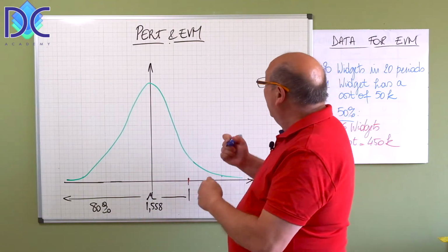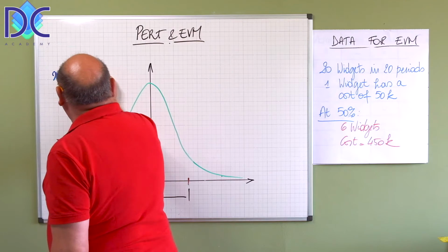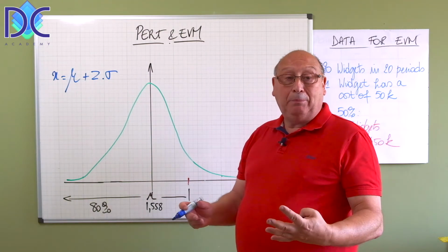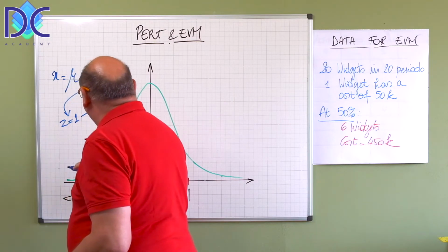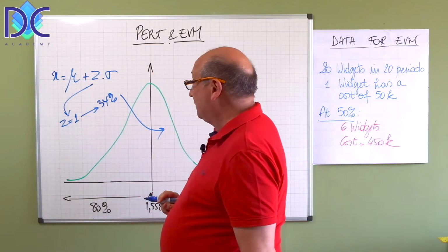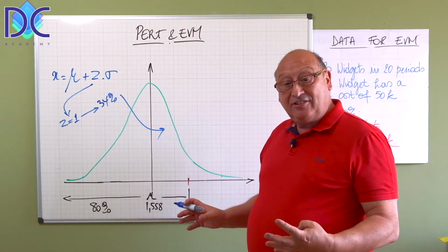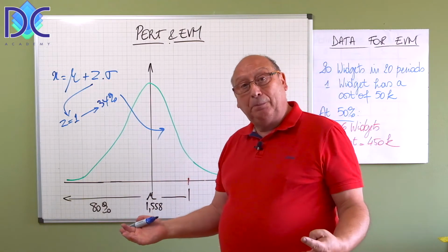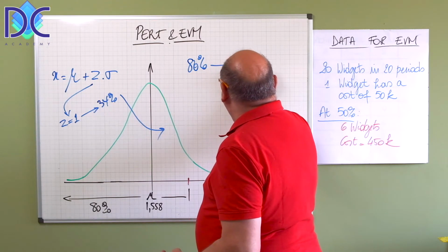Now, there are things about the formula. When we look at the normal formula, X is mu plus Z times sigma. And the Z value depends on the probability. For example, Z equals 1 corresponds with a 34% here in this area. Now, when we look at that, what we did in the previous exercise was we said, well, we have 1 sigma here, and then we have about 84%. Now, we want to have 80%. So what is the Z value?